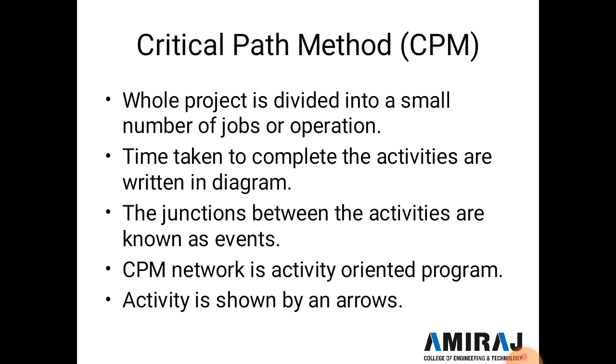So it's a dependent activity, and all the jobs and operations are dependent on each other, while some activities are independent of other activities, like electric fitting and plumbing. Both are different, clear. So both activities are not dependent on each other, so both start in parallel, meaning both start at the same time.